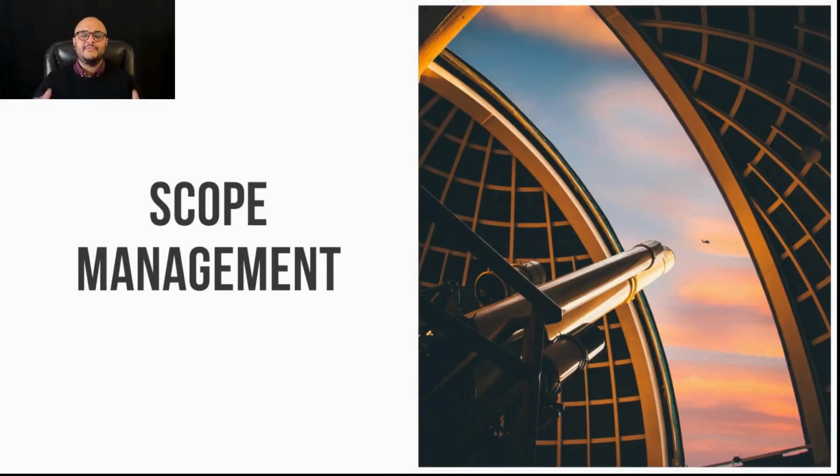We continue to dive deeper into project management, and now we're going to talk about scope management. Managing the scope of a project is a tricky business. It's your role as the project manager, but it's tricky, and it takes experience over time to know how to manage scope well. Remember, scope is one of the project constraints we talked about earlier. If the scope starts to widen, then the time on the project goes up, the cost of the project goes up. It's one of the project constraints.